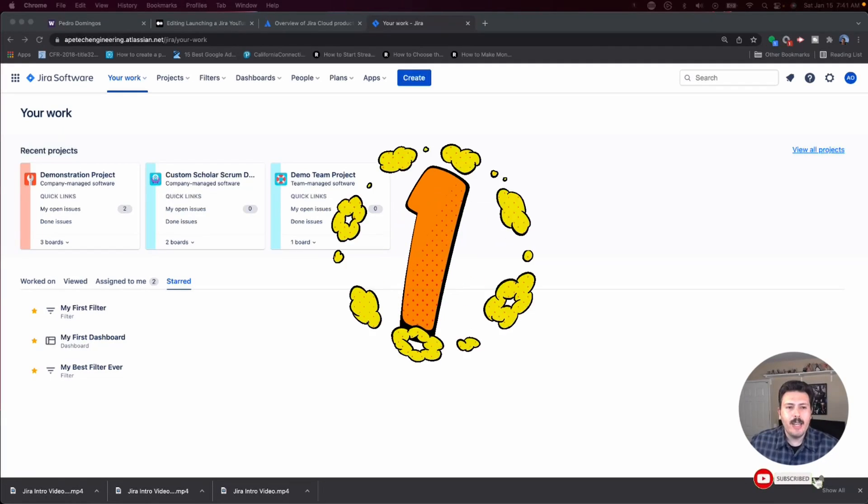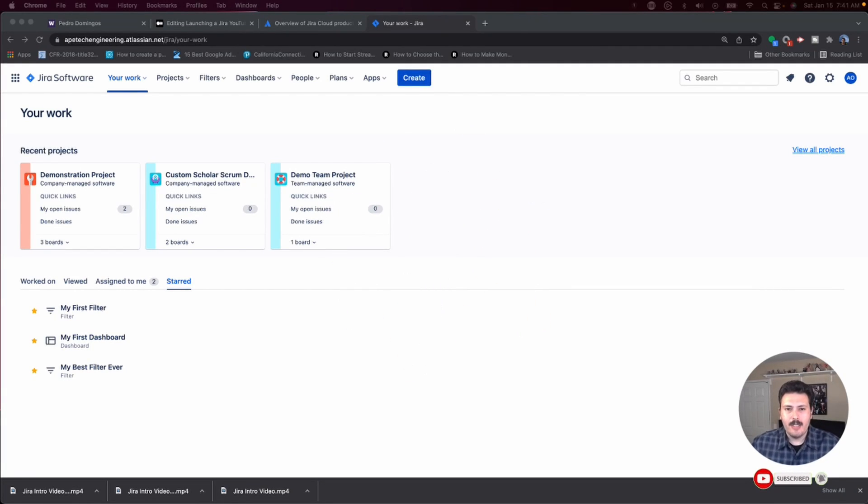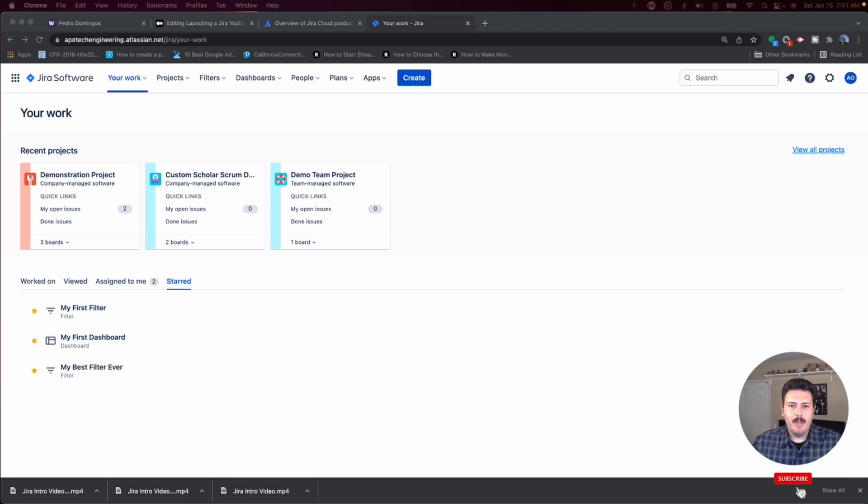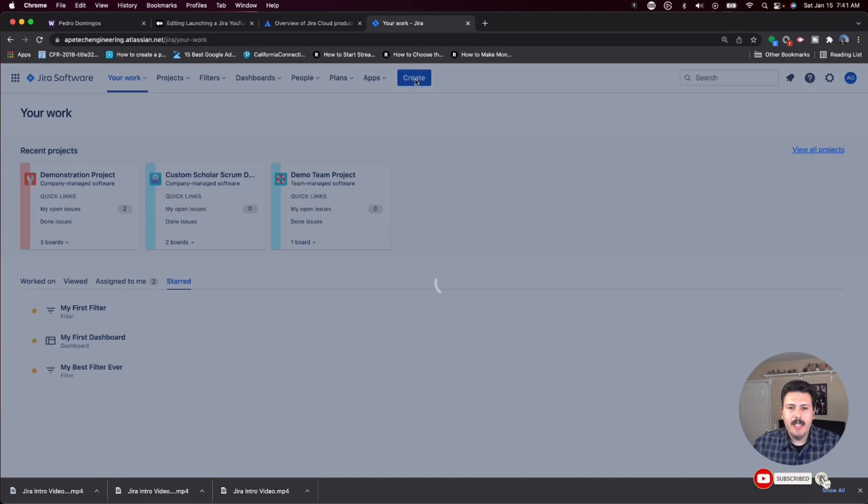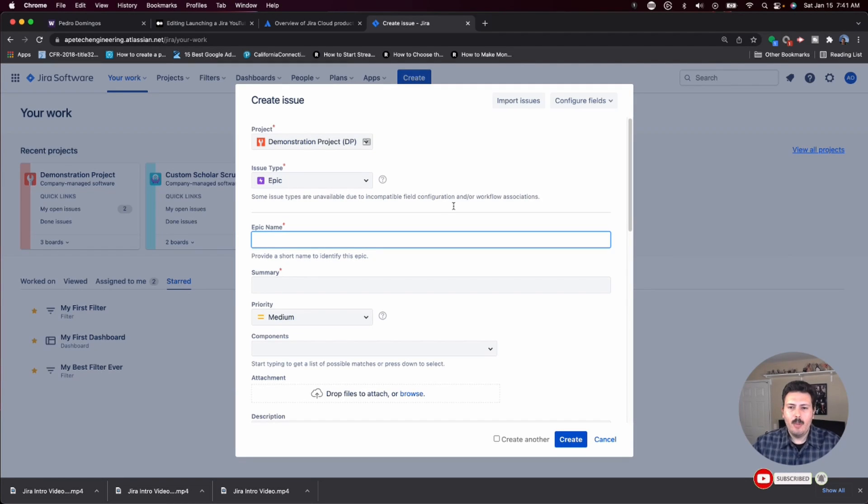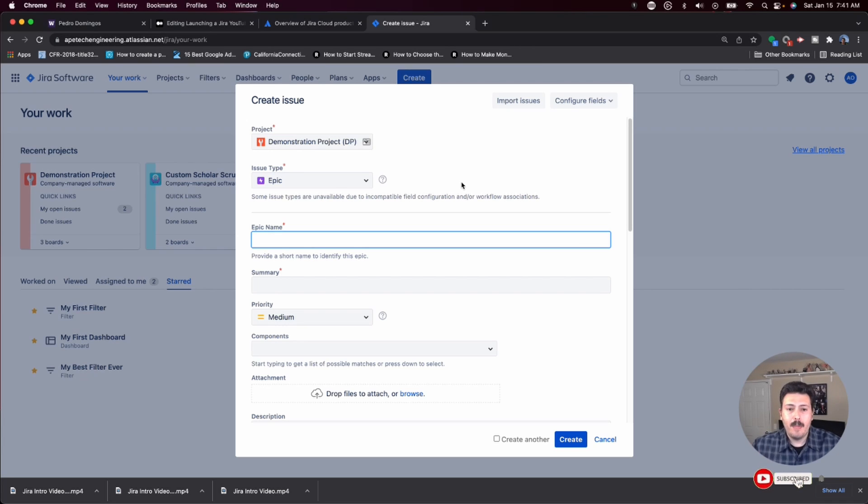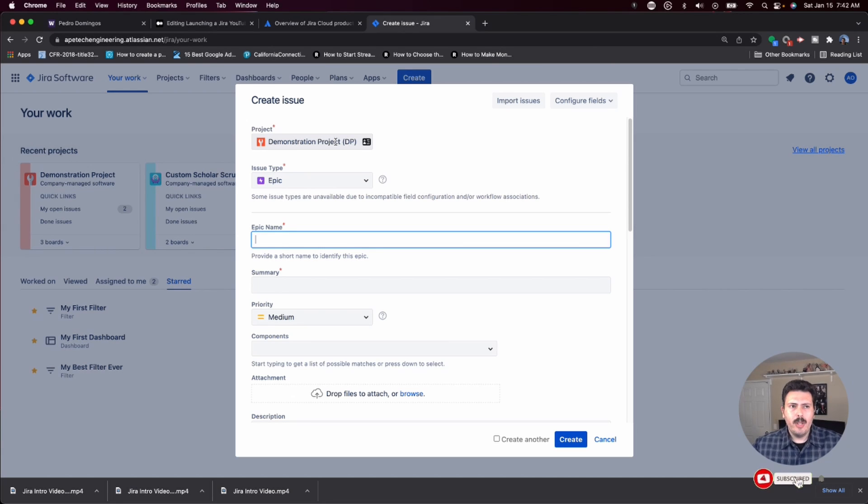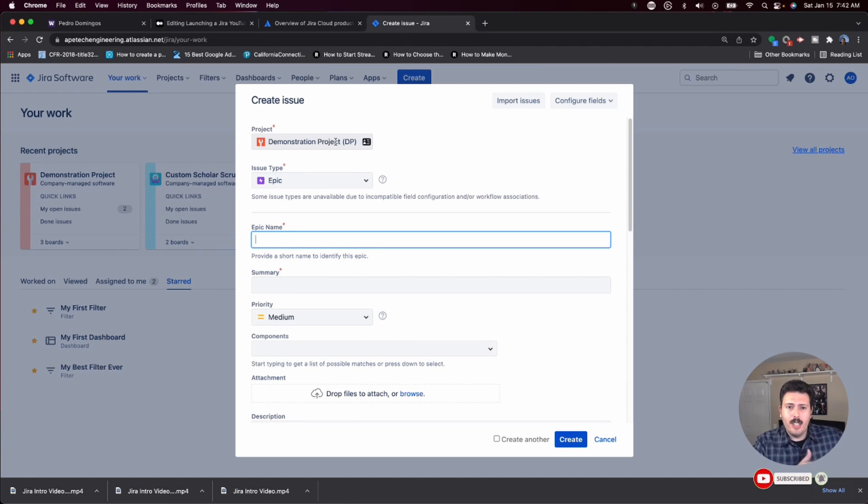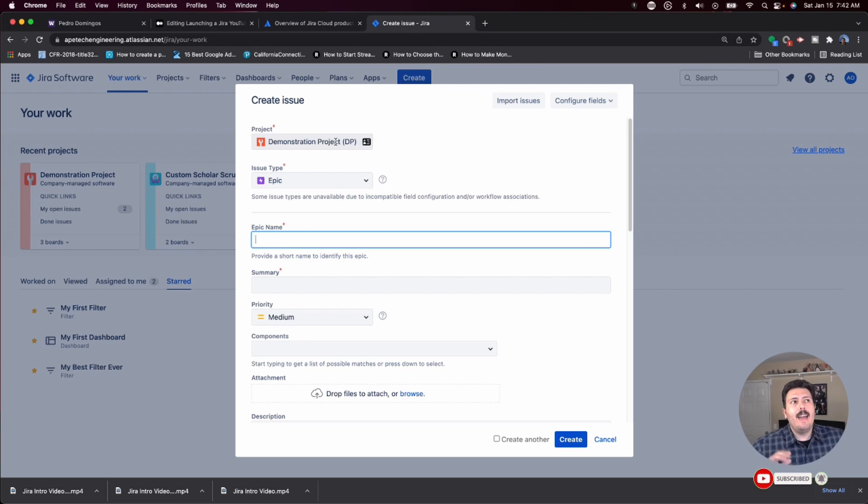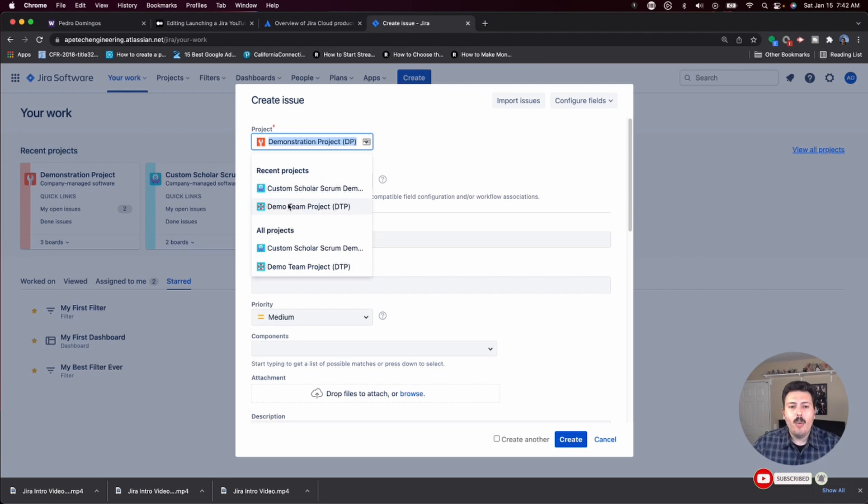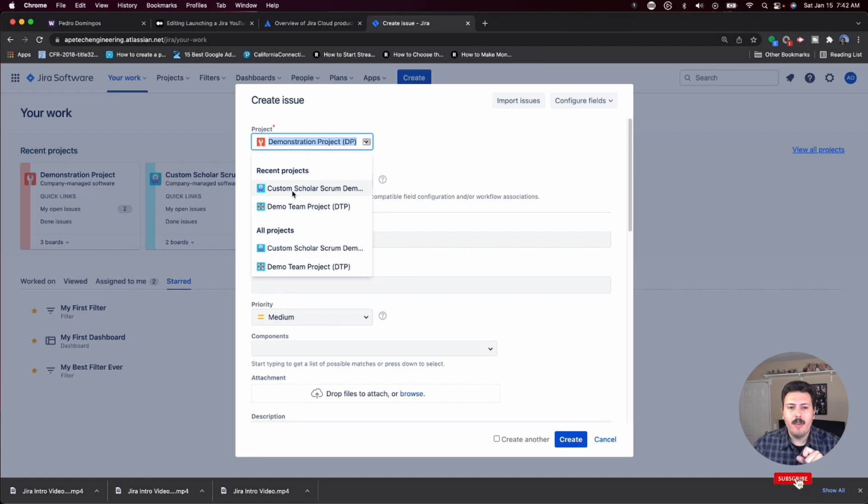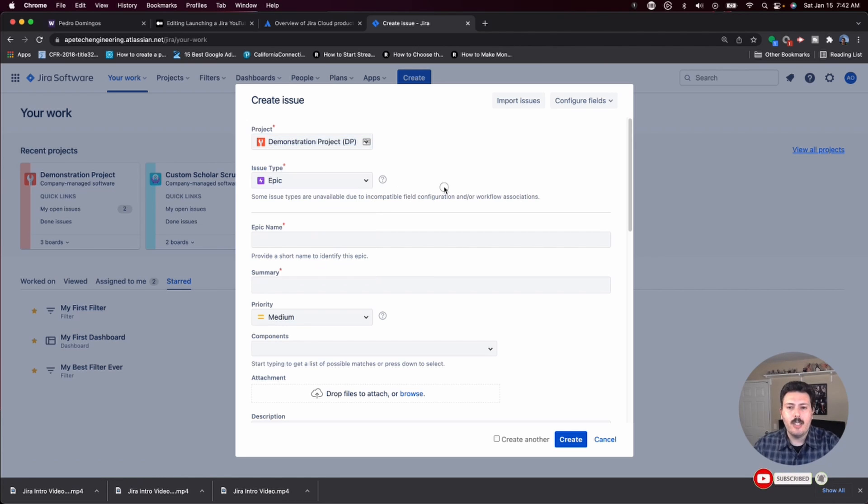The first way is probably going to be the most obvious way. In the middle of the screen, there is a big blue button. When you click on this big blue button, it's going to pop up a modal in which you'll have the ability to do some selections. First, because you're clicking the big blue button, Jira is going to try to remember where the last project was that you were interacting with and assume that's where you want to put that issue. If you don't want to do that, you're going to want to select the project and pick the actual project you want the issue to go into.